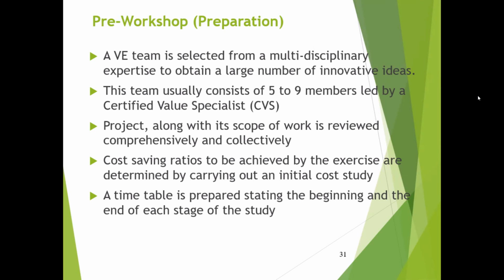So therefore there should be an outcome decided in advance, right? So the cost saving ratios to be achieved by the exercise are determined by carrying out an initial cost study. Okay. Then a timetable is prepared stating the beginning and the end of each stage of the study.